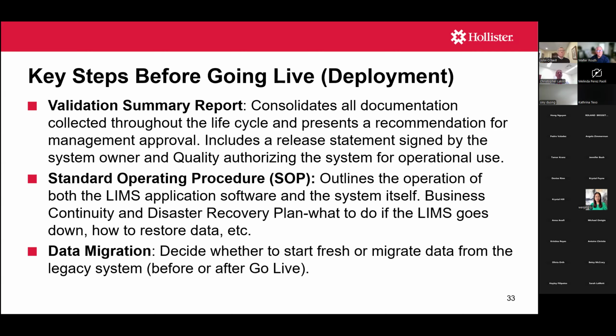We had a lot of data in Excel spreadsheets. So did we want to import all that data into the stability LIMS system when we were going live, or were we just going to draw a line in the sand and say, well, we archive the historical stability data. Anything from this date on goes into the stability LIMS system. So that's something important to consider.